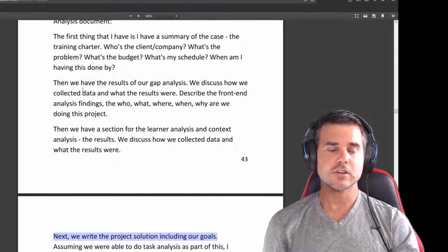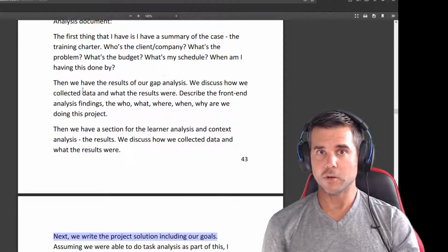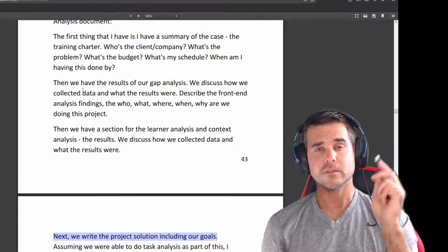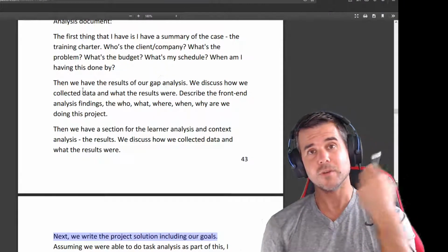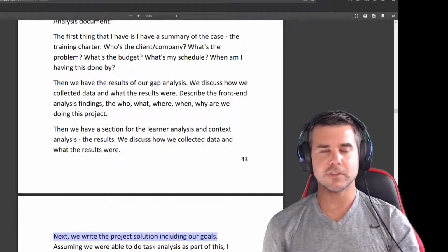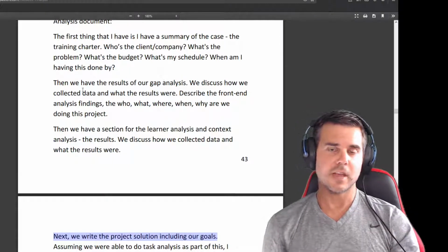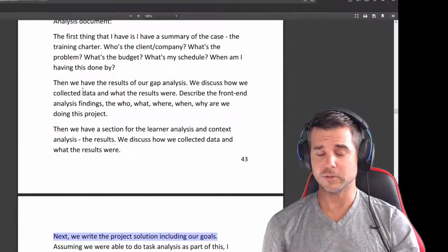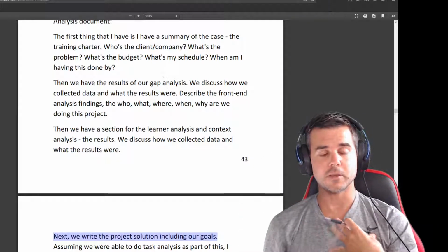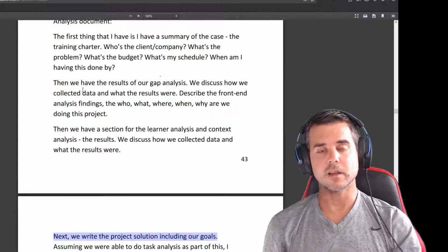And the way that I charge clients is, depending on the cost and scope, I might have them pay up front, not for the whole project, but a third. I might do a third, 50% through, and the last third at completion of the project. Sometimes, if it's a smaller budget project, I'll have them pay 50% and the other 50% at the end. It depends on the scope too. If they want video or narration or anything that I need to hire an external company to help me with, they have to pay for that up front, because I'm not just floating that money to that company.